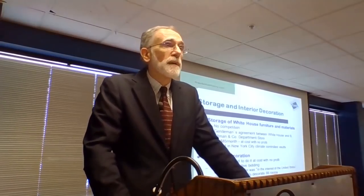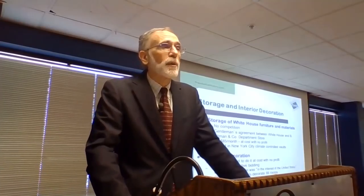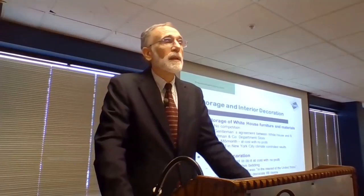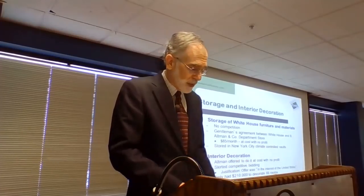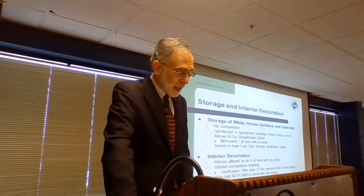Now, Altman figured if they could get their foot in the door there, they would have a chance to get the contract to do the interior design and decoration of the White House, and they were absolutely correct. They got that contract with no competition. The justification was that it was in the interest of the United States. That was their sole source justification. And again, he offered to do that at no profit. But there was only